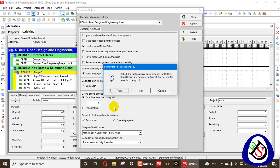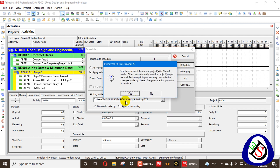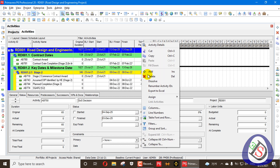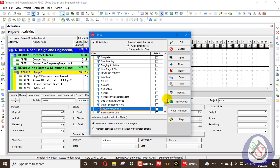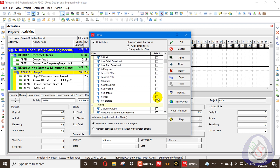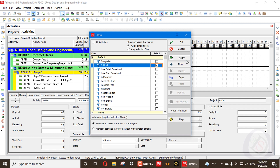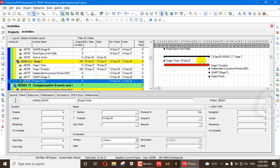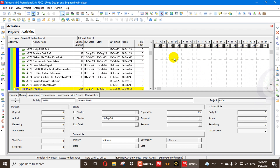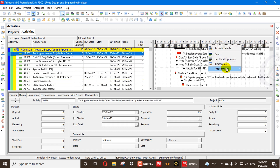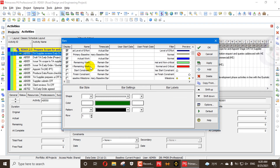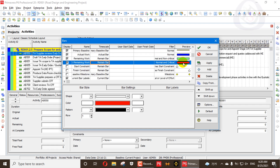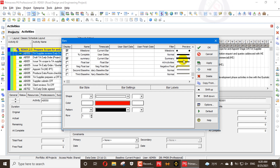When we press OK and schedule the project, the activity which has a zero float is a critical activity. We right-click here, go to filters, and apply the critical filter. The activities appearing in red are critical — every activity shown with a red bar is critical. The red bar represents that the activity is critical.